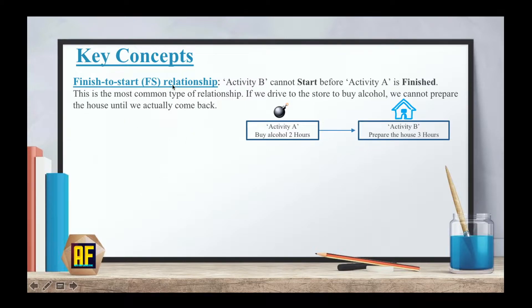Finish to start relationship. Activity B cannot start before activity A is finished. This is the most common type of relationship. Just think about it. If we drive to the store to buy alcohol, we cannot prepare the house until we actually come back.